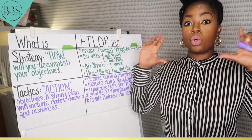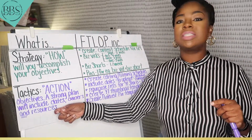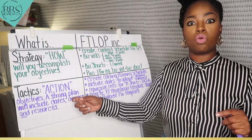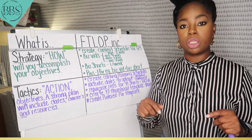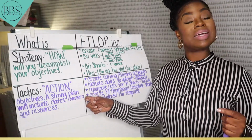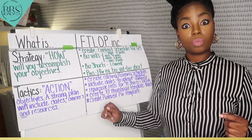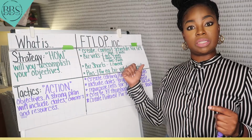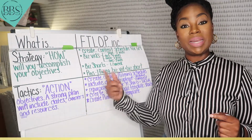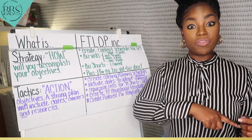If you, as the owner of the project plan, only rely on the resources, somebody's going to drop the ball. Sometimes you may say it's the graphic designer that's going to own it, because although she may not be the owner of the entire project, she may be the last step in the process. Nicole filmed it, and then she passes the baton to the editor. Now the editor makes all the edits, but then he passes the baton on to the graphic designer, who